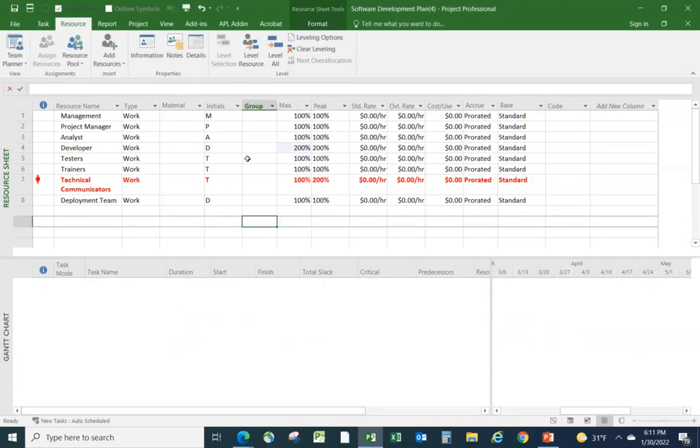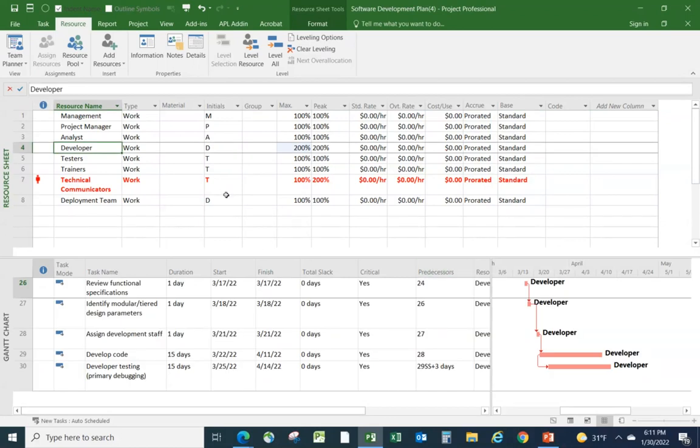So my team will consist of 2 developers, I meant to say. So I want to get another developer. I don't want someone testing their own stuff. So a developer is going to develop the code and a developer is going to test, but it's going to be a different developer. So I haven't pushed out the project. I've just gotten hold of another developer. Now, as we get closer to actually doing this, then instead of just saying developer and developer, I would probably change these out to have named individuals on there.